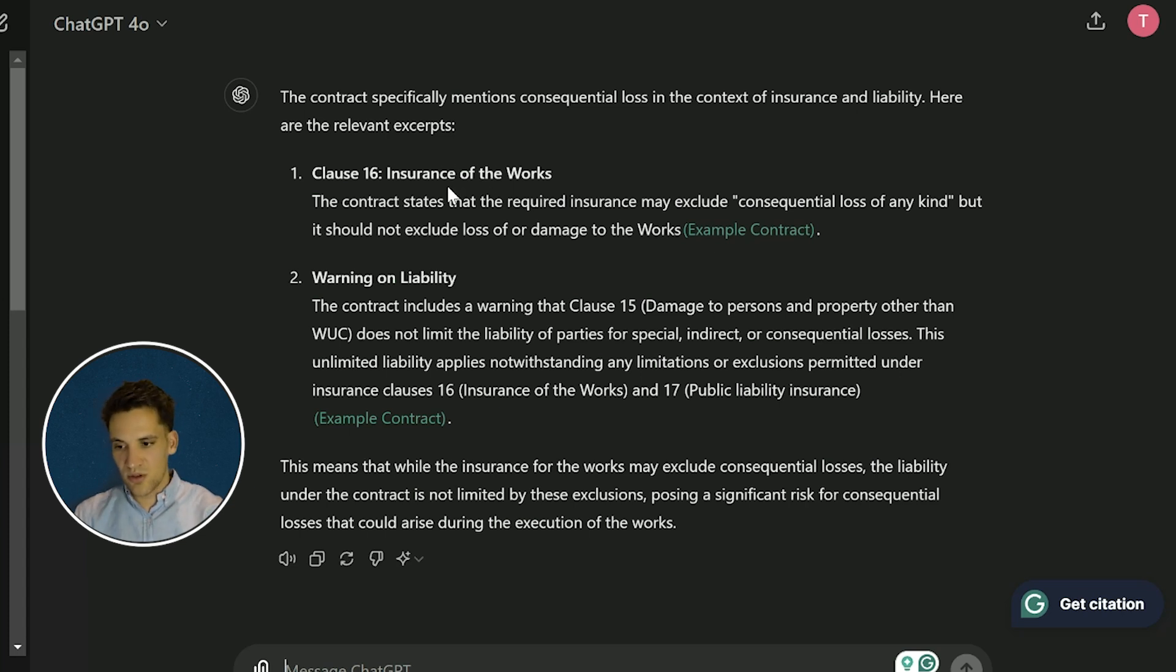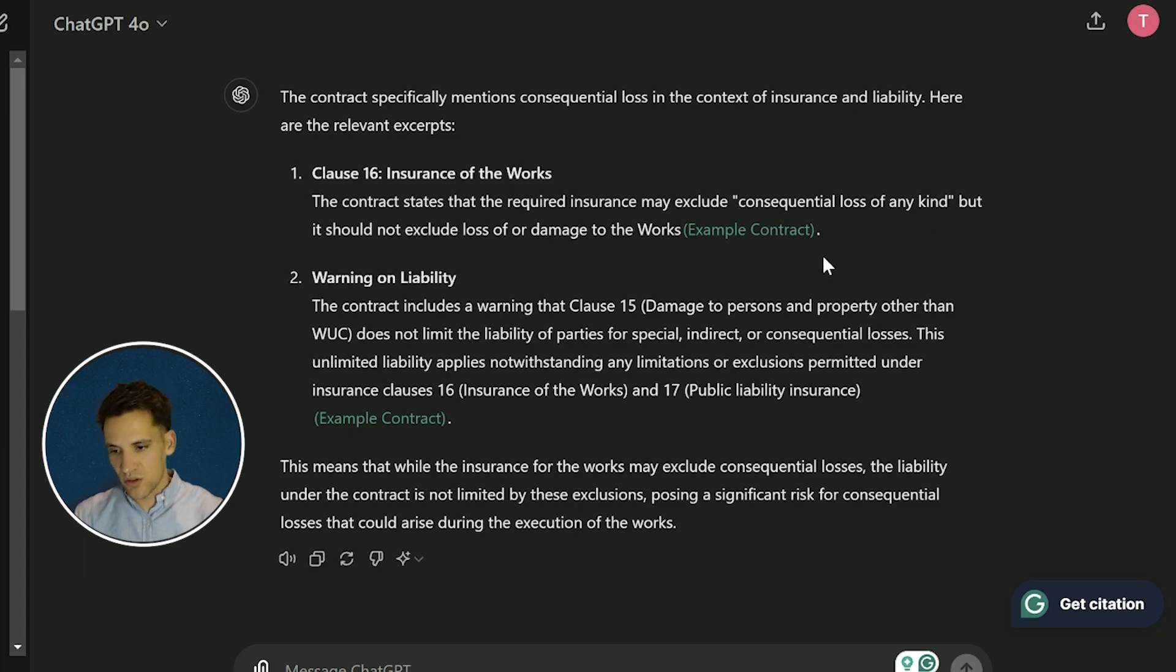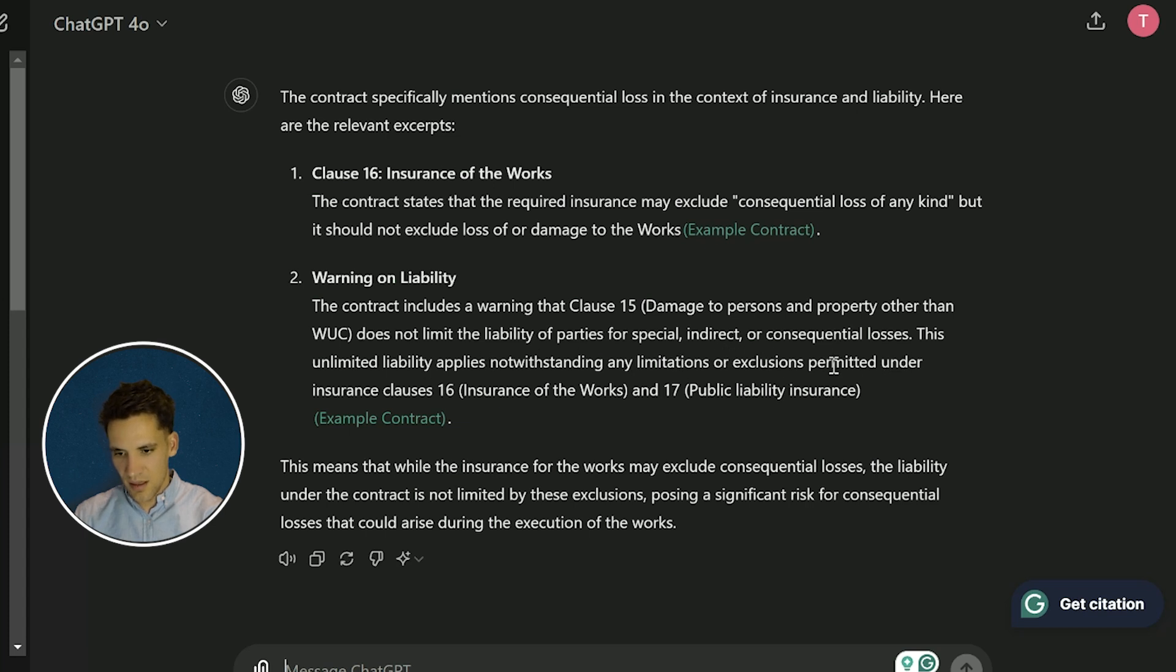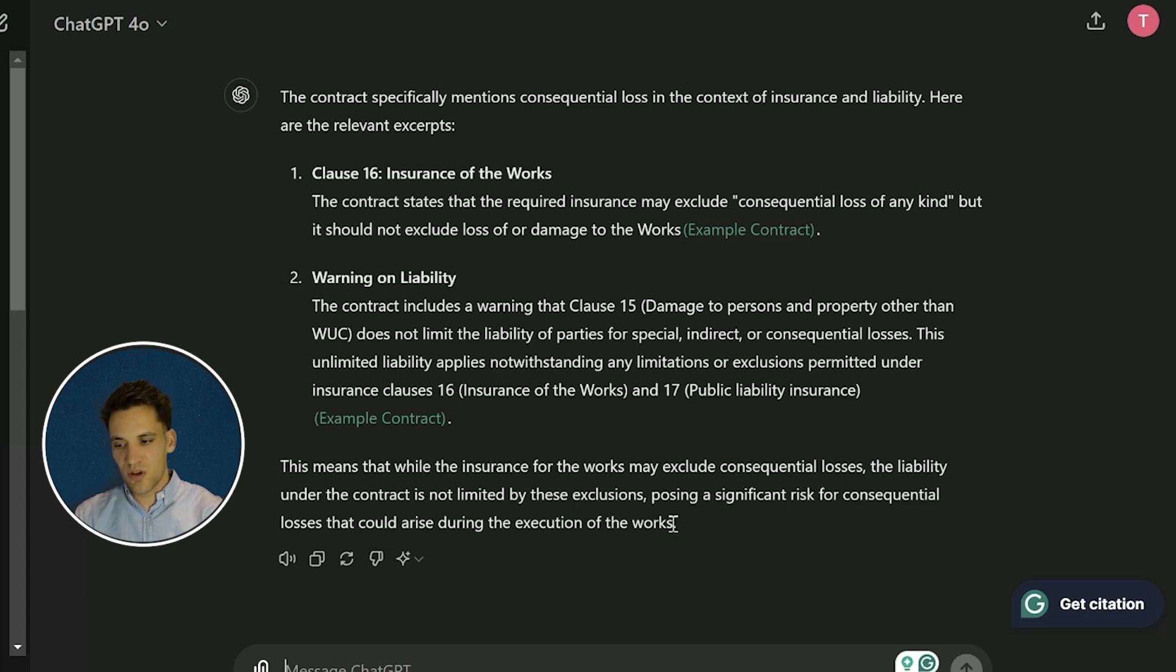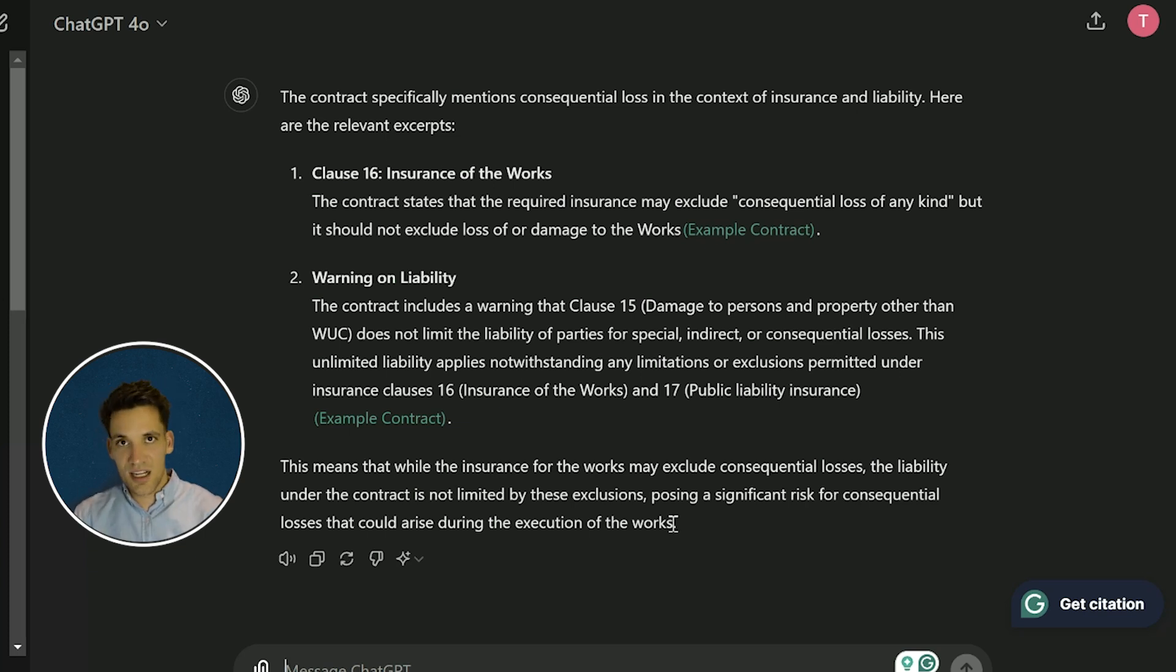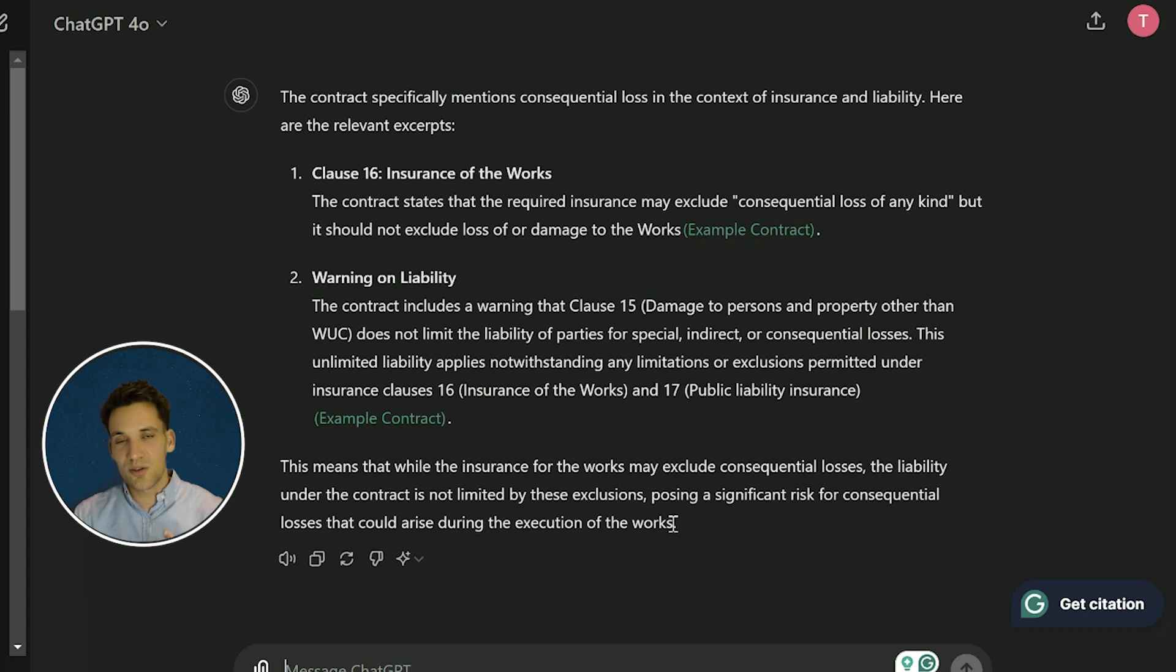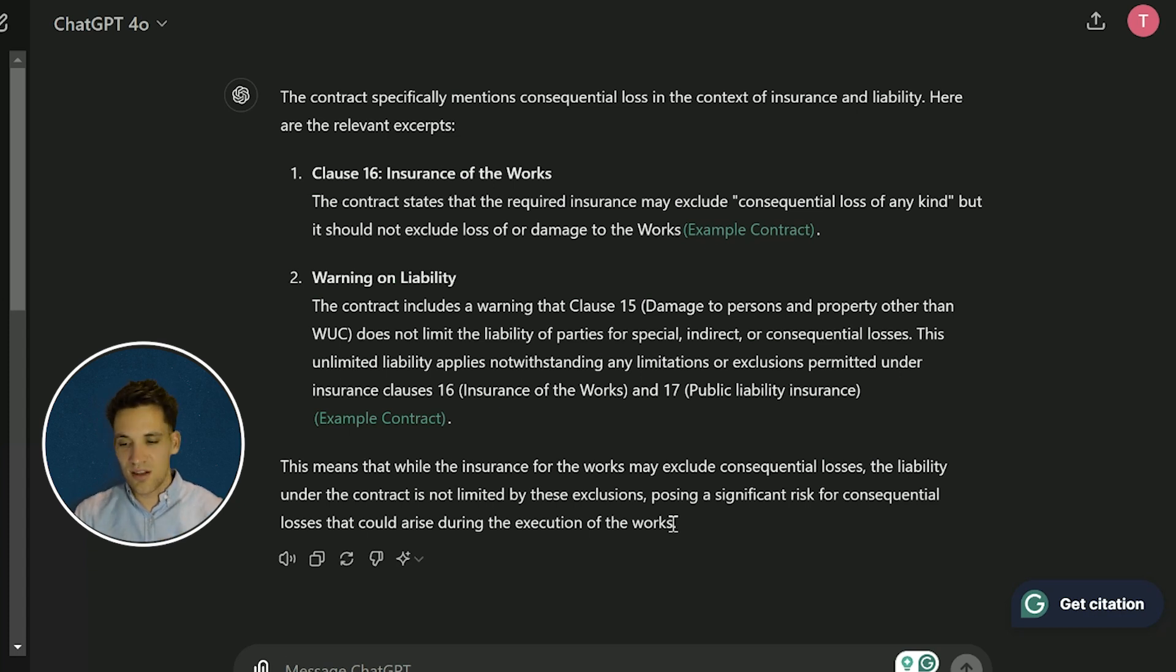It's identified that the contract specifically mentions consequential loss in the context of insurance and liability, and here are the relevant excerpts. It talks about insurance of the works - your insurance can exclude consequential loss - and it doesn't limit our liability for consequential loss. So again, you can ask ChatGPT questions about the contract and it will actually provide you expert advice and direction on how to review it.